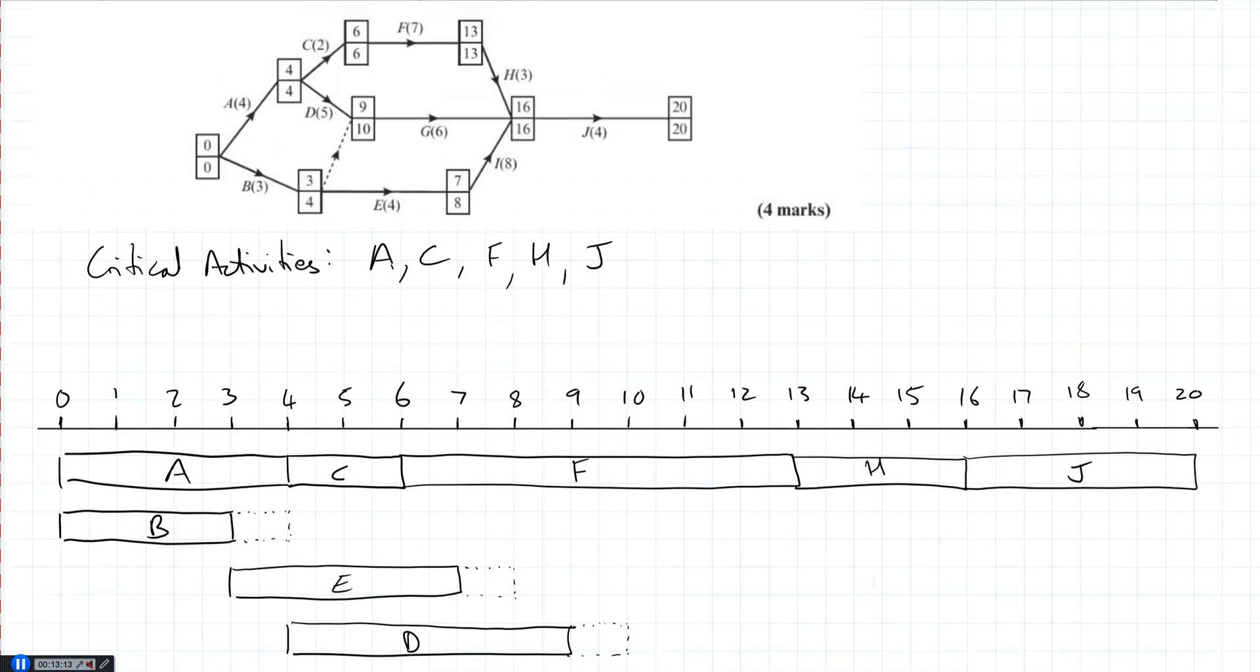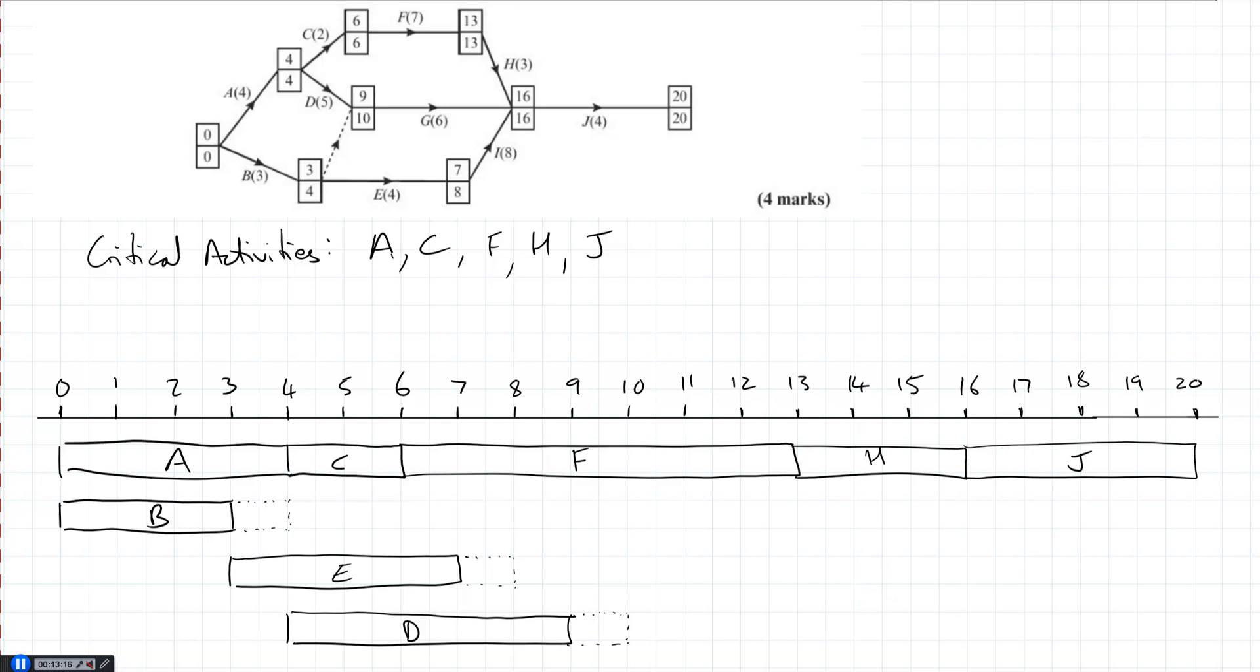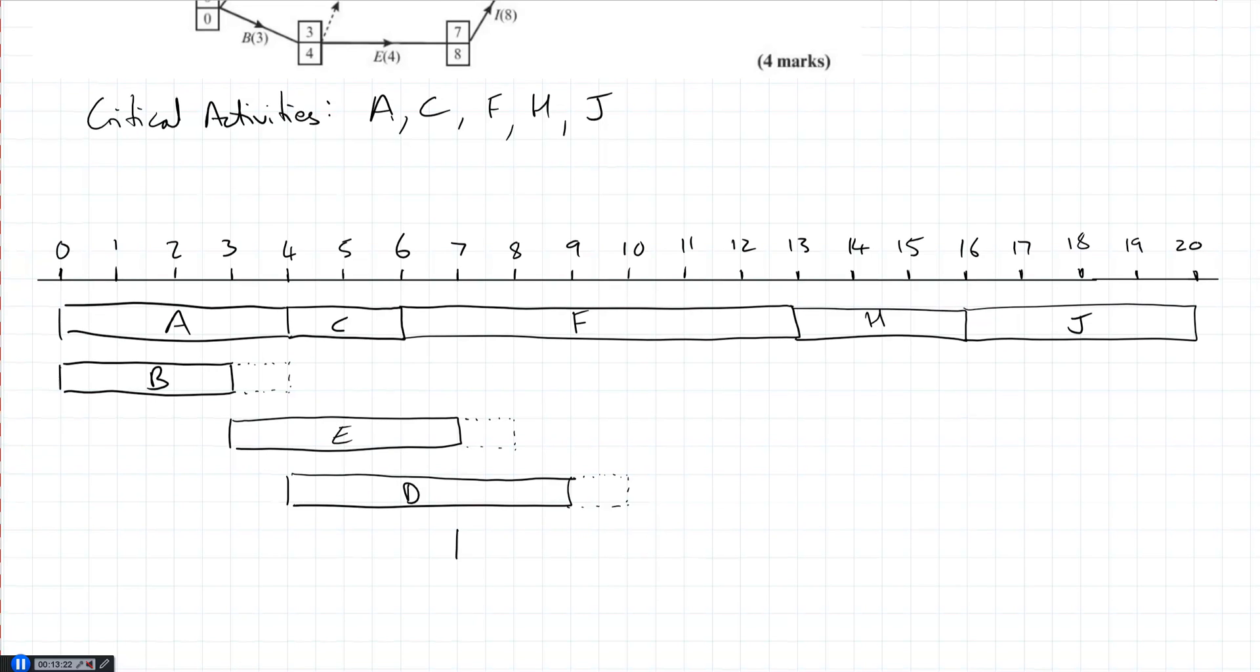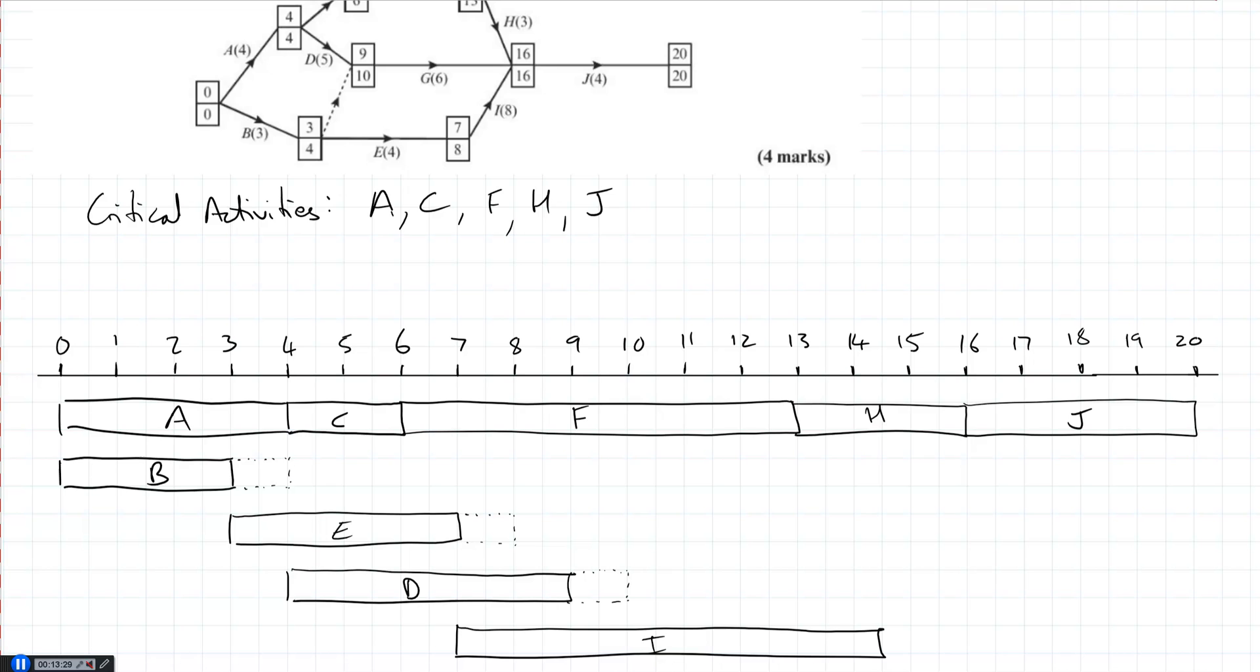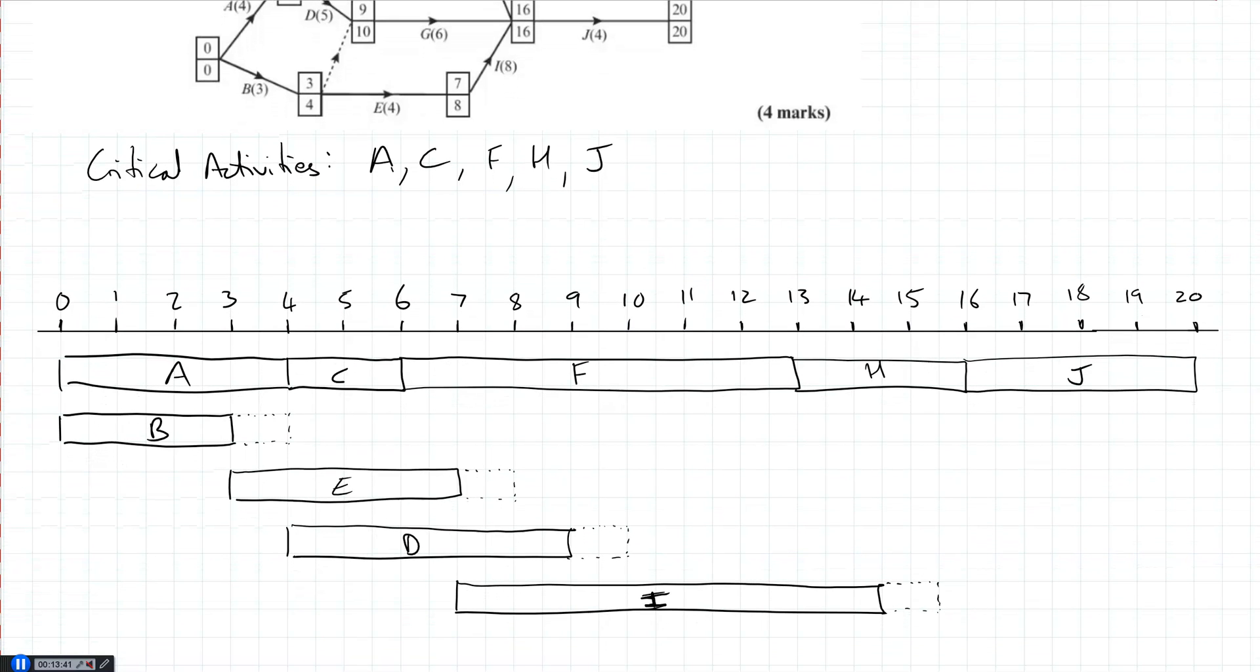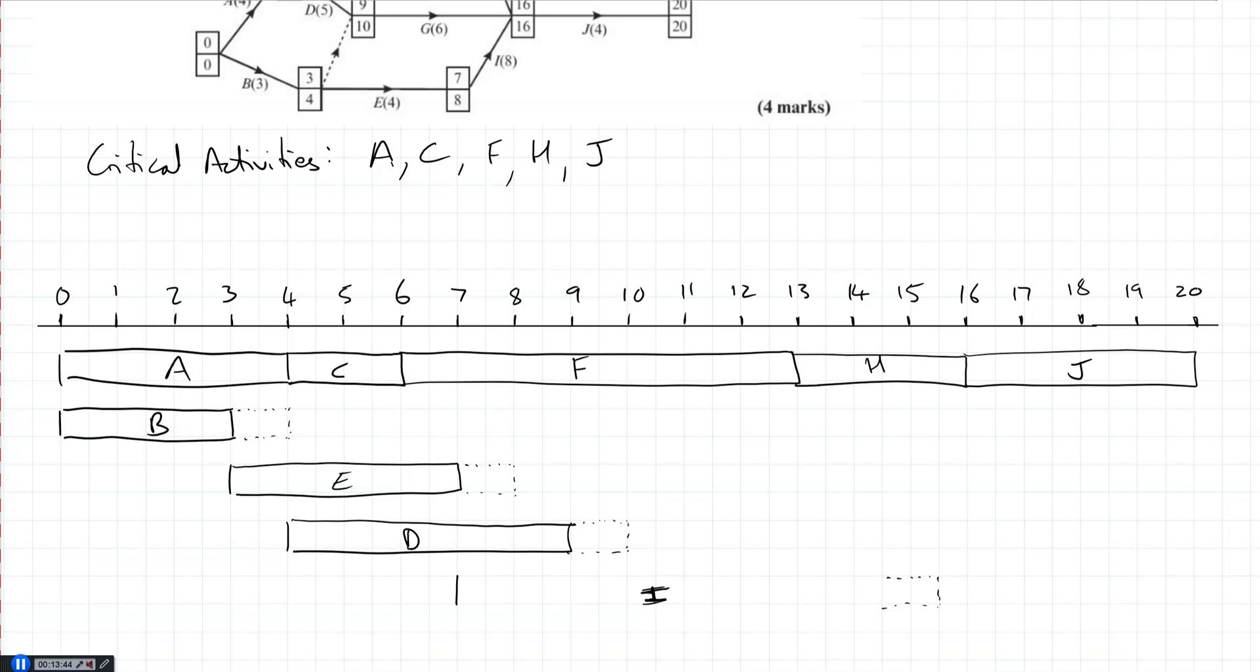I can actually start at 7. So I'm going to go with I. And it takes 8 days. So we can go up to 15. And it's got a float up to 16. It's got a float of 1 as well. 7 to 15. And then float of 1. It's very easy to make mistakes when you're doing this. So be careful.